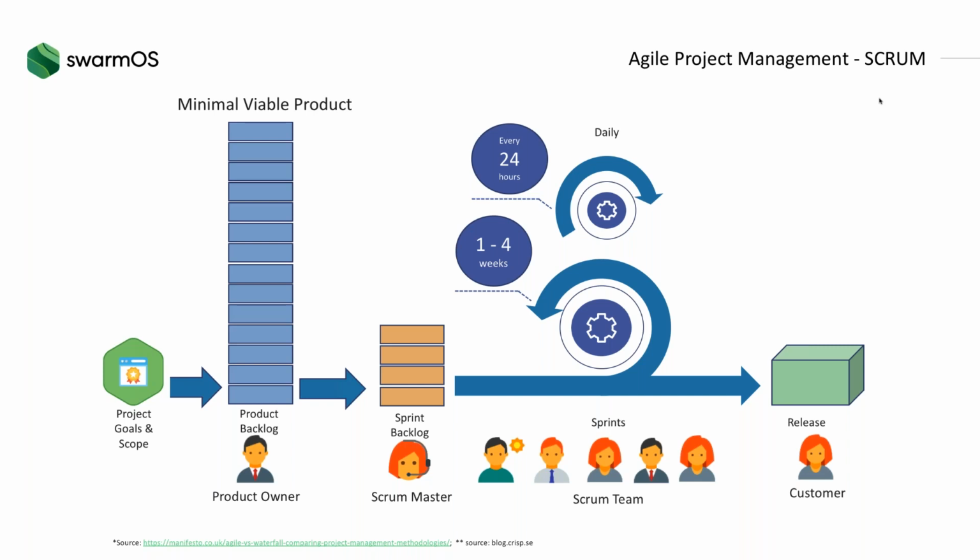We have obviously a product backlog. We have different deliverables, which are user stories as well. We can take something into the sprint backlog and work on this during the next 2 weeks. We have our dailies. That works fine in business as well. But the testing and the deliverable to the customer may be different, because a business delivery could be a contract. It could be that you hire something, that you get a government permission to do business in a certain country, that you establish the supply chain. So obviously the outcome and the sprint review look slightly different.